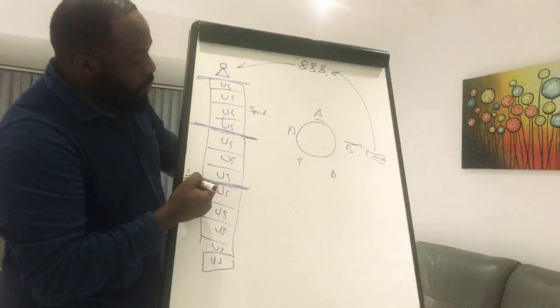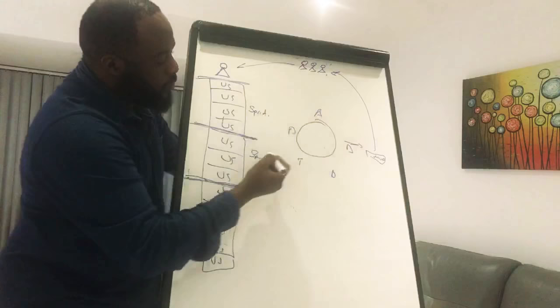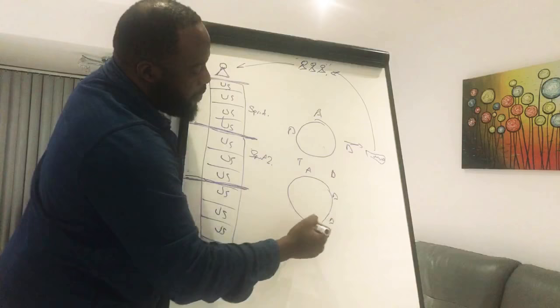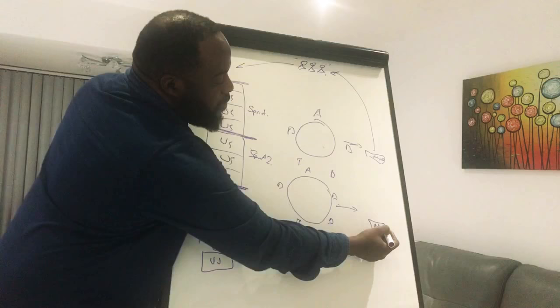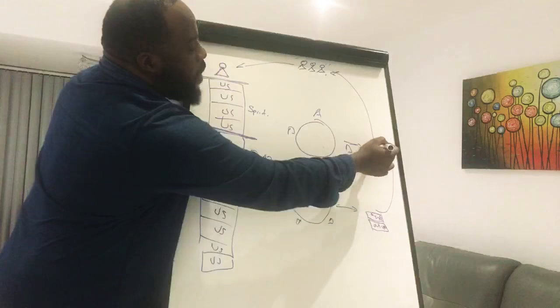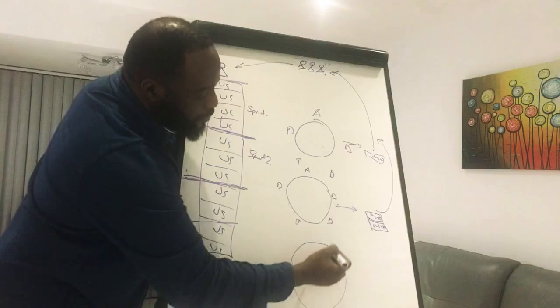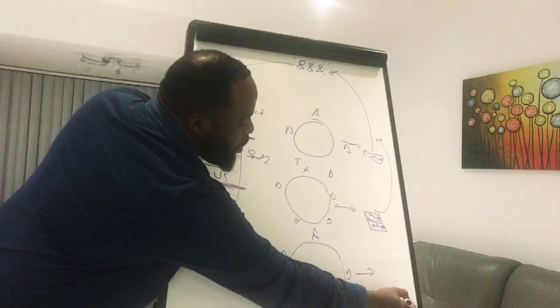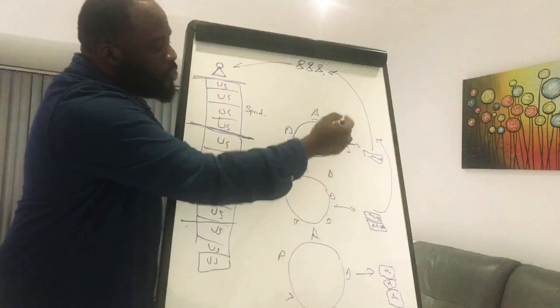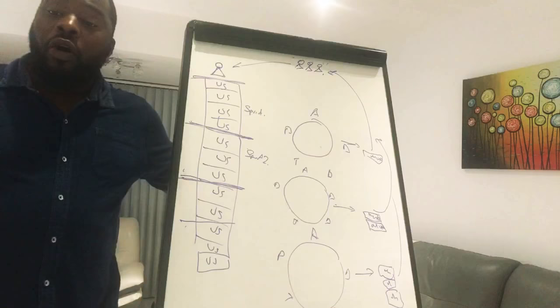And then we now move on to sprint two, okay? Because we've delivered this one. So for sprint two, we're going through that same process again. Analyze, design, develop, test, deploy, we ship the product out. So now we have the first minimum viable product, and we now have the next minimum viable product. Once again, we get feedback from the customer, we reprioritize and we repeat that process all over again, okay? Analyze, design, develop, test, deploy, and we ship it out there. So we now have three deliverables, okay? And we keep doing that over and over again until there is no more value in continuing, or until we have depleted all of the requirements.